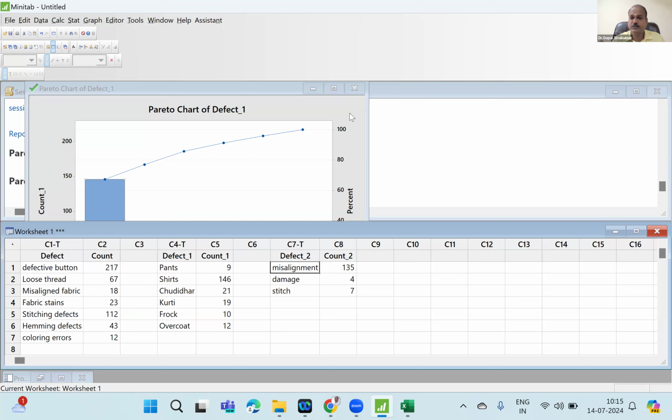If you need multiple metrics to be improved to arrest a customer complaint or customer dissatisfaction, then that should be treated as multiple projects. In one project, we only improve one metric. Clear, all of you? Only in a rare scenario where everything is very simple, you may achieve multiple results. But normally we use Six Sigma methodology to handle complex problems. So the problem is already complex in nature. You must try to work on only one metric.